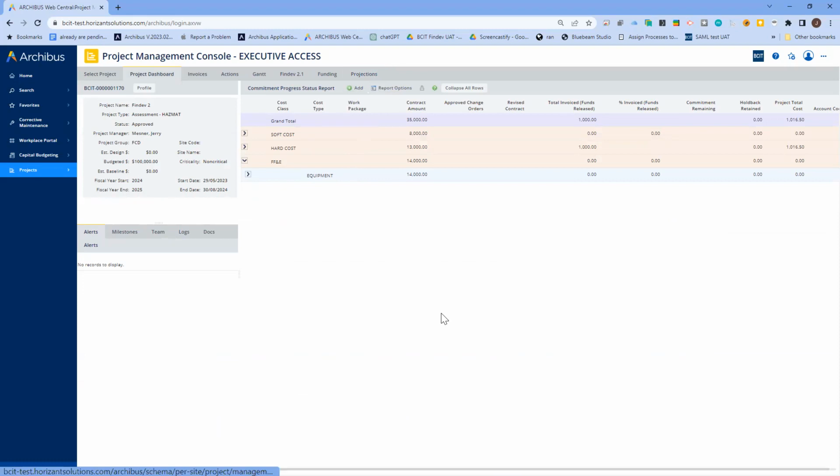The other use case is Ryan comes in after this goes live on June the 9th, and he's got 122 projects under his purview. When he comes in here, you'll remember that when things are not balancing, there will be yellow stripes and alerts showing up on the projections. Again, what the system is going to do for any of Ryan's projects or any of your projects that are already in the system is do that math that we described. It's going to take the contract amounts, divide it by the months, and split it out.